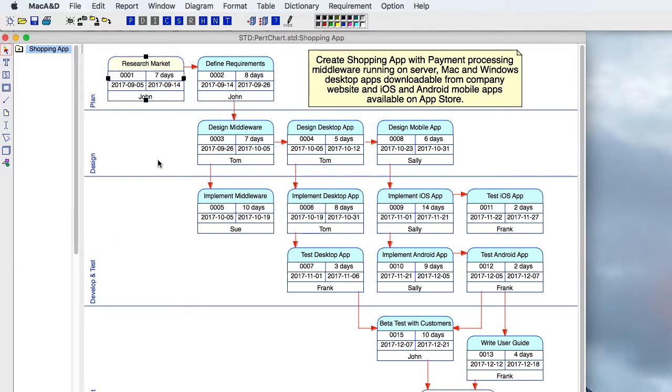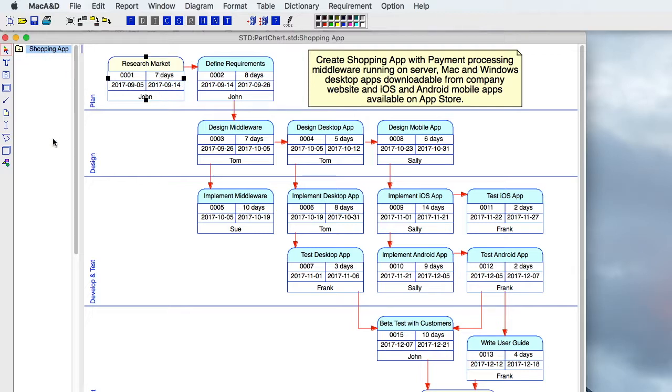And as you go through and do that for each of the tasks in this project, it will determine if there's any conflicts to ensure, for example, that you can't start a task until the preceding task has been finished. If you have multiple projects, you can create as many different diagrams as you want, each defining different projects. Some of the employees may appear on multiple diagrams within multiple different projects, and the tool will make sure that you don't have any overlap between task assignments.